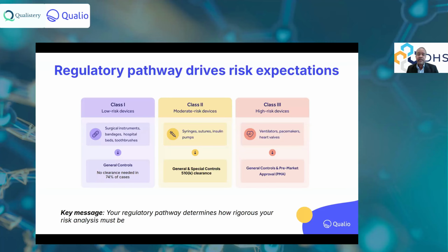Also, you have a fantastic tool in the form of a pre-submission meeting to review these with FDA and see if they agree with you, right? So we do that on many of our projects. We build our regulatory strategy, do a pre-submission meeting with FDA, align with FDA on classification of the device, on the codes, for example, on predicate devices, for example, and then also on the level of burden required for V&V, the amount of clinicals we need to do, which has a huge impact on the time it takes on clinicals, as well as the money you spend on the clinicals.